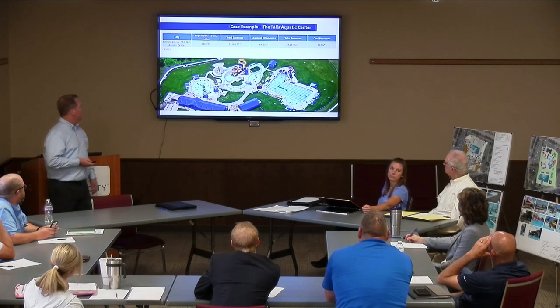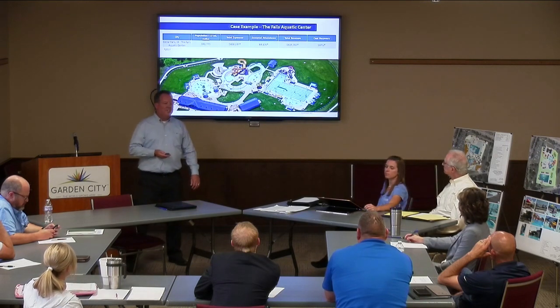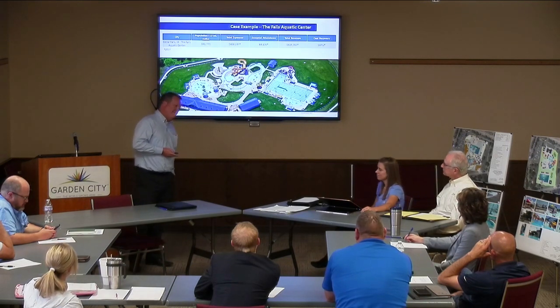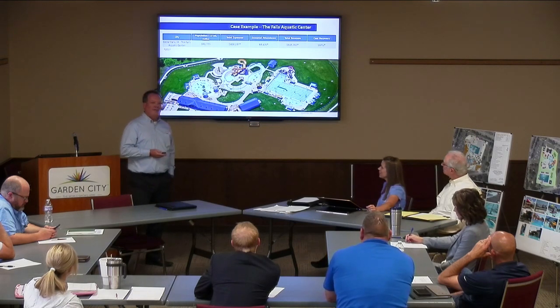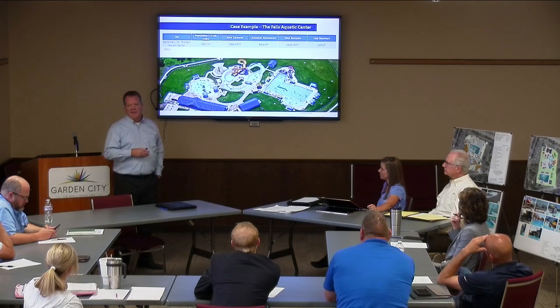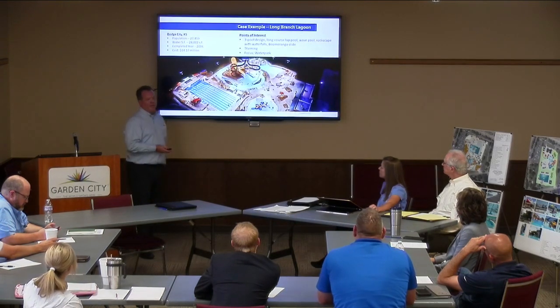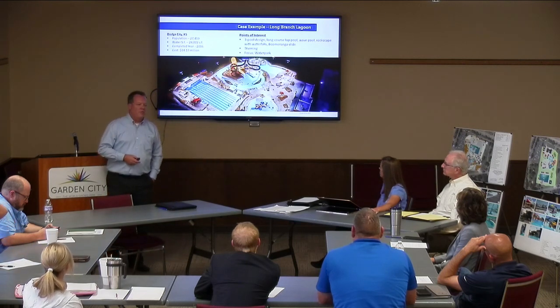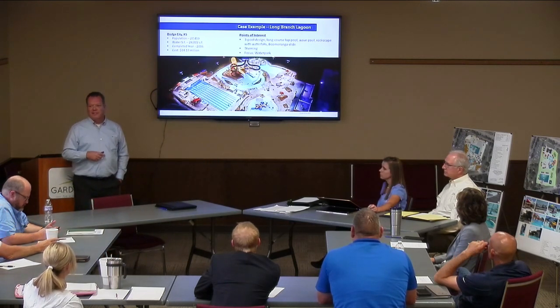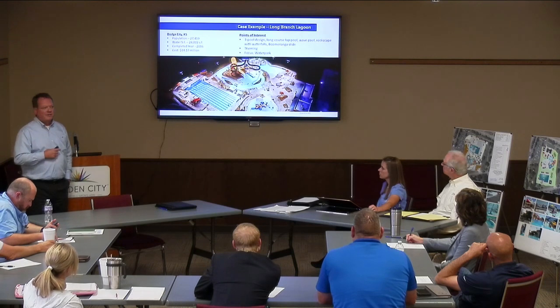What did that one cost to build? You didn't have it on the first slide? I didn't, because this one is 2006. This one's ancient by now. Yeah, but I was just curious. It was like 6 million-ish back then. Sure. So I started to project it to today, and I was going to put like 4% inflation through it, but then there were a couple years that were down and a couple years up, and I didn't try to assign it. That's fine. And that's something we can provide to you too. Yes. And interestingly, there's a big range based on the amenities and things. For the same size facility, the cost might be quite a bit different.